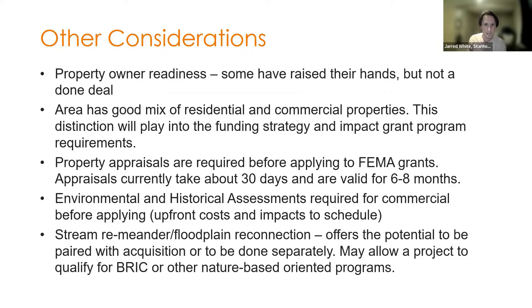An important distinction: residential acquisitions versus commercial have different requirements. Commercial requires environmental and historic assessments — EHA — which impact grant timelines. For the near-term HMGP money, we're not planning to do commercial properties because of those extra steps. But going forward in the coming years, that's what we expect to work through to get those commercial buildings acquired. With that, I'll hand it back to Doug to elaborate on the different pots of money and put some dollar figures in context.